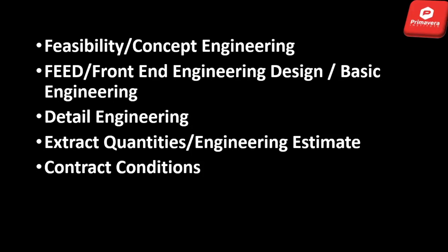And while you are doing all these things, you also have to develop the contract conditions, which we are also going to discuss in detail in this course. At the end, you have to go for the bid to hire a contractor or project developer. This consultant or third party is going to help the client collaborate on feasibility, FEED, detail engineering, extracting quantities, and contract conditions, which will be adopted during the execution of that project. And at the end of this, you will go for the bid and hire one contractor.